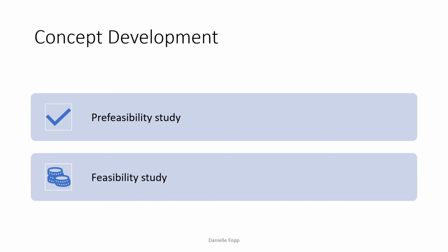Both the pre-feasibility and feasibility study must be related to the local environment. It should also be noted that a feasibility study should only be carried out if the necessary financing facilities can be identified with a fair degree of accuracy. There would be little sense in completing a feasibility study without the reliable assurance that, in the event of a positive study output, funds could be made available for the project.